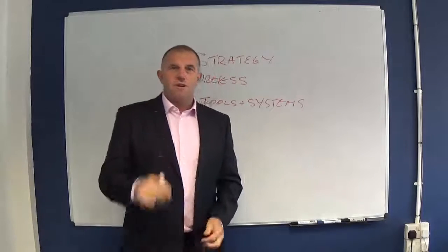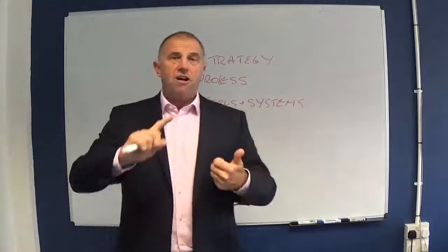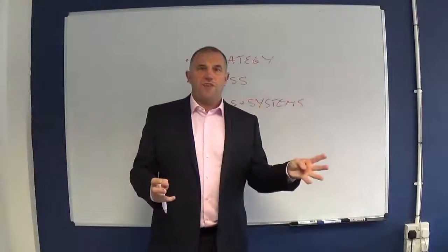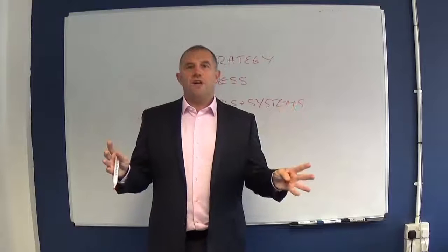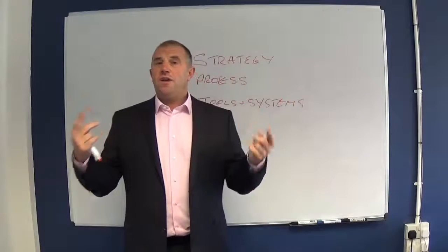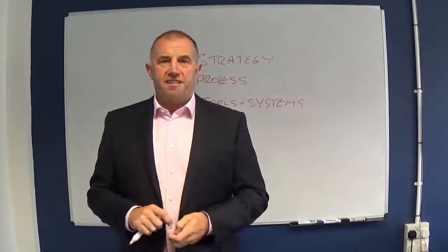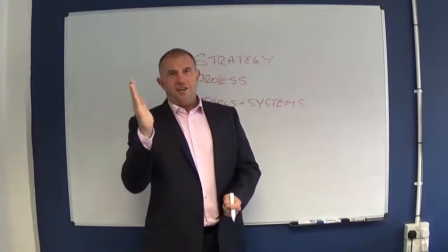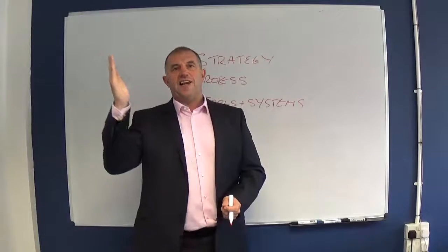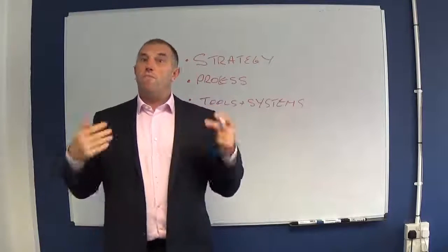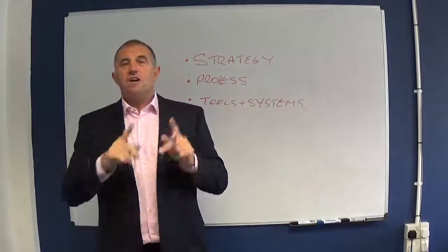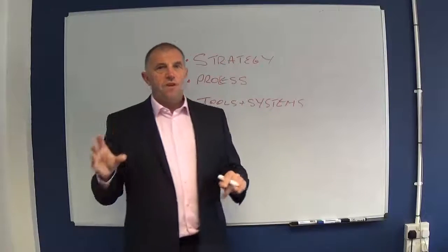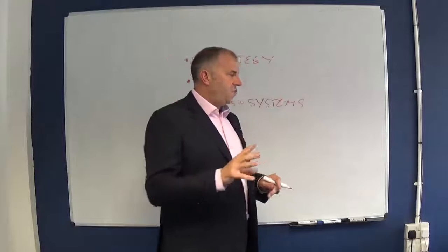The things that cause programs to go wrong are risk cocktails, where one risk explodes and all the others go with it. Nobody saw that one coming. And the other one is what they call the domino effect risk, where one risk happens and slowly that delay knocks onto another delay or something like that. Or the bill goes up here, there and everywhere. So we've got two types of risk. Your process needs to cope with both of those, as do your tools.